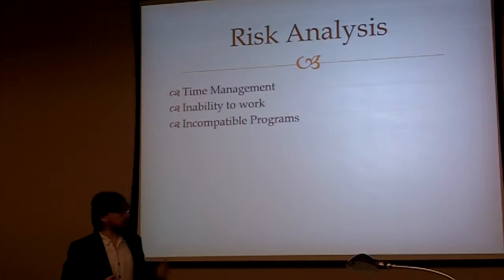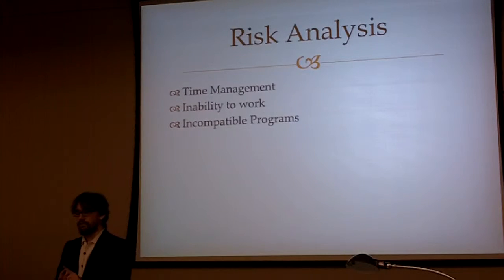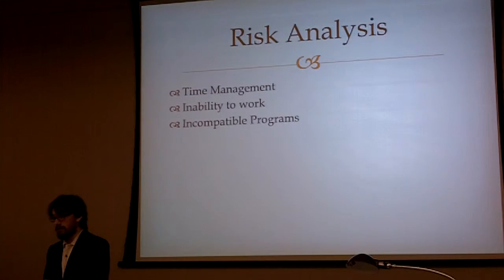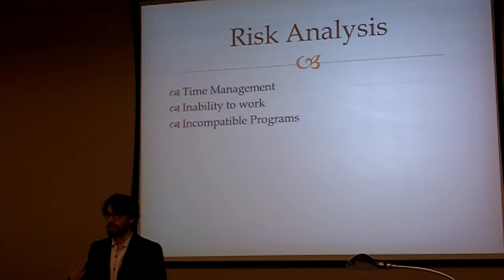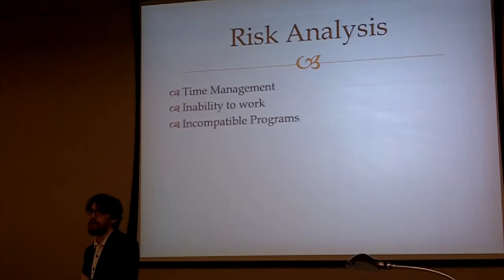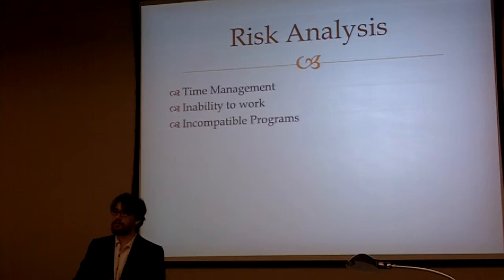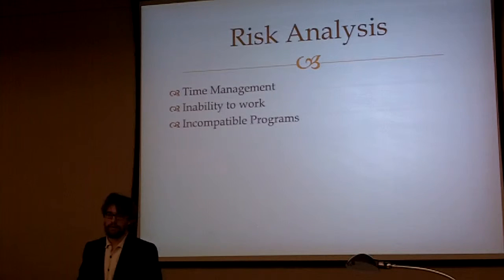If a user is missing, such as from an illness or a sudden death in the family, any tragic event that would cause them to miss work, we have determined that they should email us as soon as they can. And then the two remaining users will set aside an hour and a half to work instead of this hour in order to ensure that there's enough time to complete all features required of that week.